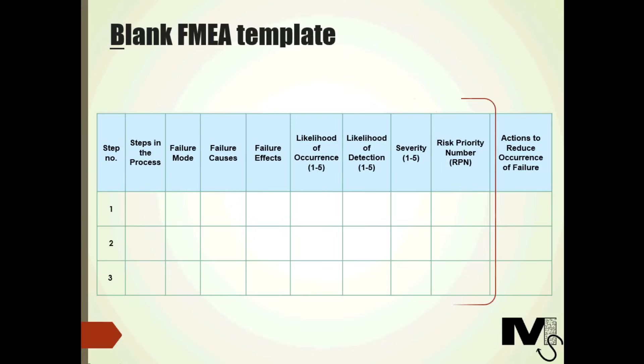Once the three ratings are done, we multiply the three numbers we get to get a risk priority number. This gives us information on which steps to prioritize. And if there are multiple processes that one's running, one could look at the RPN totals for each process and see what can be prioritized.